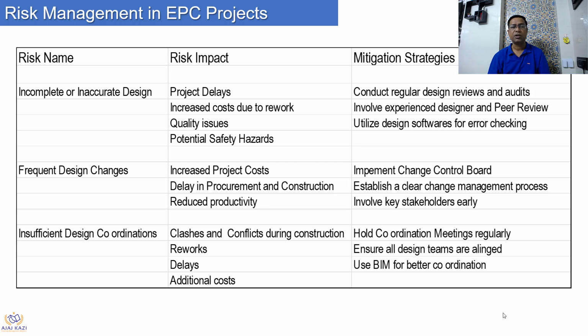The third important aspect is insufficient design coordination. And this happens, I've seen it multiple times. The impact is clashes and conflicts during construction, reworks, obviously delays, and that adds to additional costs.